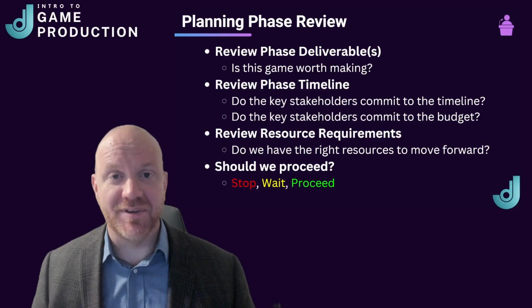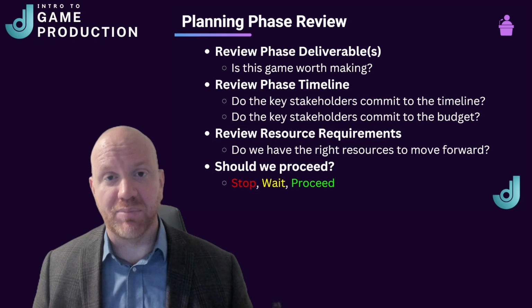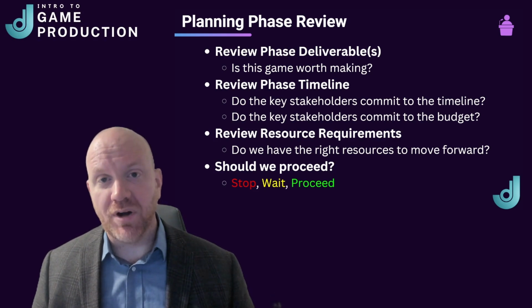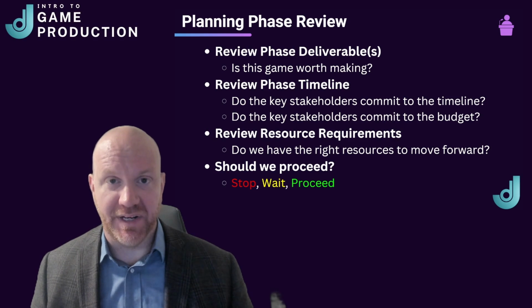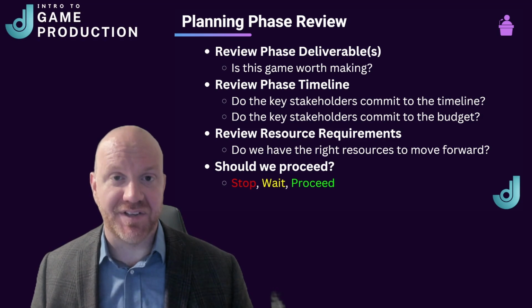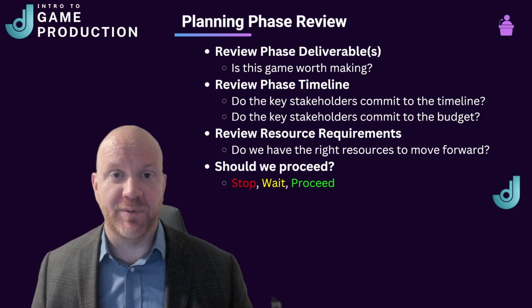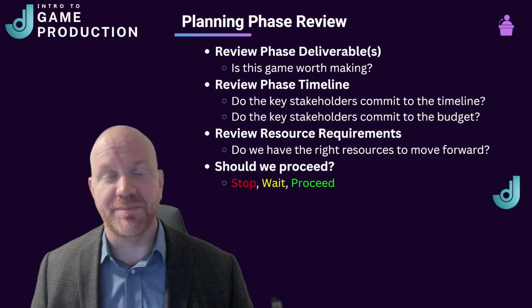So now we have some of the basic things filled out for our project. We've reached the end of our planning phase. So you'll want to have a planning phase review meeting, and you want to pull in all the key stakeholders, all the investors, management, anyone else that has a vested interest in the project. And you want to have a meeting where you review everything that we've done so far. And the goal of this meeting is to determine, is the game worth making?